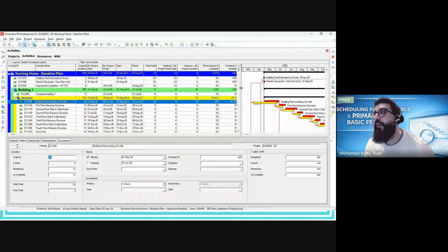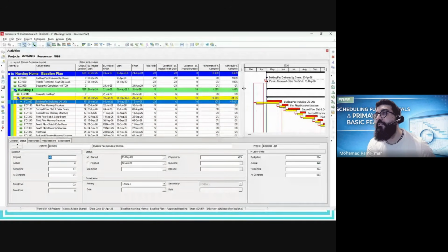This is another way to do another type of variance analysis. You have the actual percent complete and the scheduled percent complete. Your scheduled percent complete is 3.46% versus 0.42% actual. So you have a negative variance in progress. And here I will open a bracket. And this is my last comment before giving the floor to my friend and colleague Ahmed to close the session.